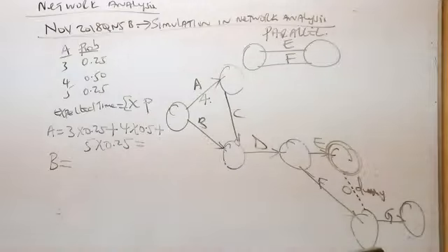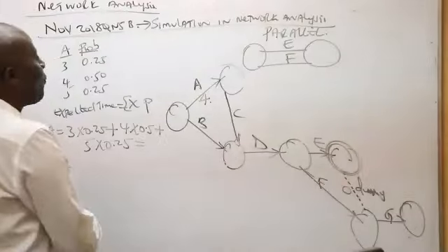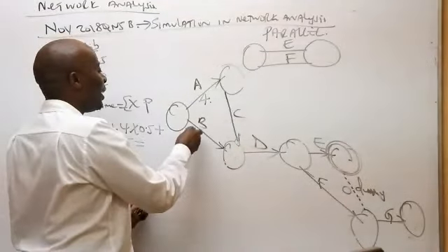For now, this is what we are tackling: we are getting the expected value of B. For B, I can see the three time estimates. So for B, I'll take 4 times 0.15 plus 5 times 0.3 plus 6 times 0.2 plus 7 times 0.2 plus 8 times 0.15. Great. So they're telling me B is 5.9.